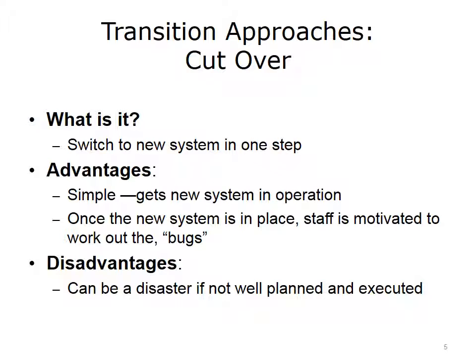There are several different options in terms of transition approaches. One approach is a cut-over activity — just what the name suggests. You have a date and time when you pull the plug on the old system and switch to the new system. Most knowledge workers are familiar with cut-over in simple ways, such as when they upgrade to new versions of software. Cut-over has advantages because it is so simple, but for custom health IT systems it is typically only feasible when there has been extensive preparation and the systems in question are low risk and straightforward.